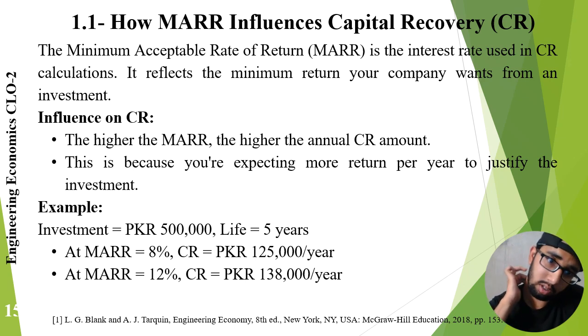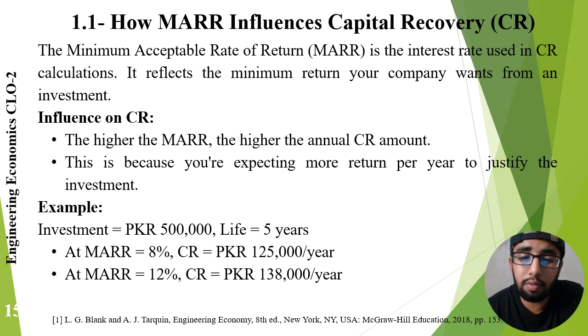Now, the 15th slide is of MARR, minimum acceptable rate of return, and capital recovery. It represents the minimum return that the organization expects from an investment. The choice of MARR has a direct impact on capital recovery calculations. As the required rate of return increases, the annual capital recovery amount will also increase. In project management, minimum acceptable rate of return serves as a financial benchmark during project selection.